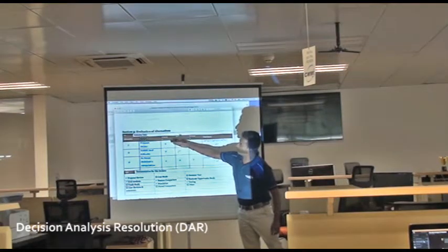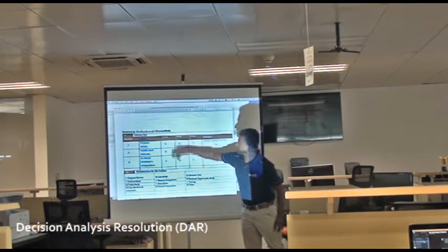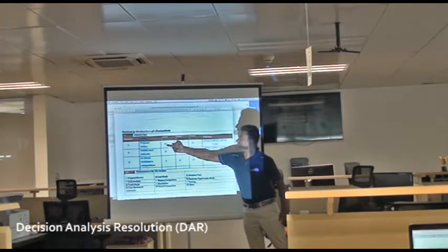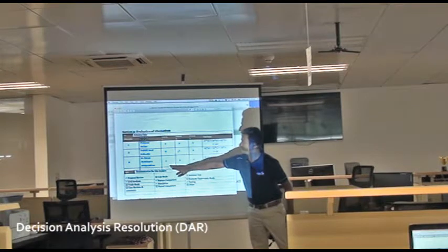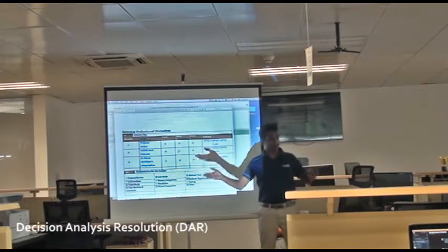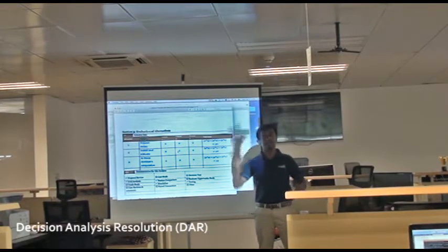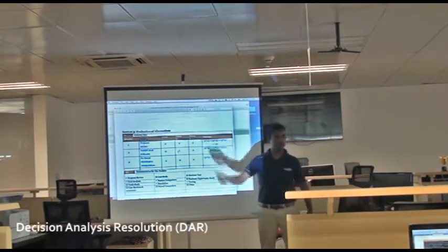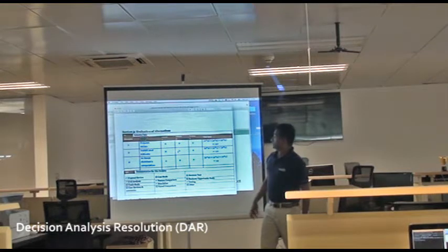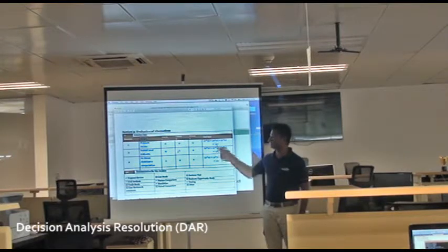So here I'm in the performance review. Okay, so all participants get together and they discuss which option gives more performance. So here we rank it as 4, and the third, and here we just give weight. You can rank like 1 to 5. You give 1 mark to the low performance solution, and the high marks to the solution that you prefer, that the team discussed. Okay, so then you give the points, right? Then the score is taken from your evaluation criteria and the ranking. So these are the values.